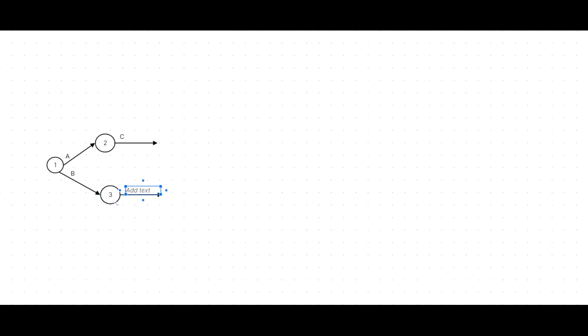Can start D. The next, for the E, we should complete CD. The problem is, for the F, we should complete C only. If the situation is like that, skip the activity E, give the priority to the F.